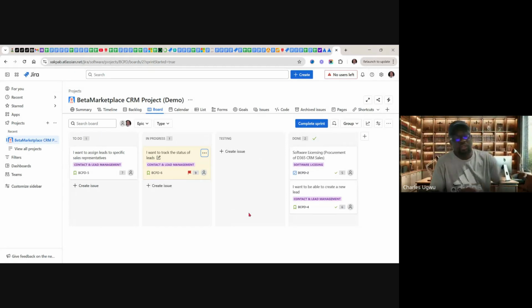This shows that anybody who is looking at our progress will know that one of the developers here is stopped. And once the Scrum Master sees that somebody has raised a red flag, the Scrum Master will come to the rescue and ask you what's going on, and you say your laptop won't work. It's okay. The Scrum Master will go meet the IT team. If the IT team can fix it, they'll quickly fix it.